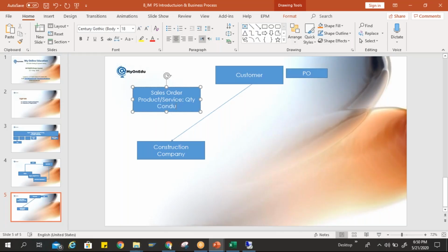All the conditions, meaning what is my basic base price, and on top of that what are the other conditions, meaning the freight charge, is there any VAT or GST, any taxes applicable. So all the conditions will be there. Along with that, the payment plan will also be there. In the payment plan it will be mentioned how we are going to do the billing to my customer. Let's say if my customer says when you start a project, I'll give you 10% as advance. In the billing plan it will be mentioned that 10% has to be paid in advance.